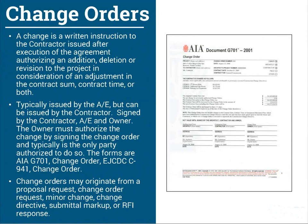The change order can become the center of contention on a project. It may also simply cover previous communications — a proposal request attached to it with a signature page summarizing the impact. It can be a cover for the change directive that formalizes what has been debated and agreed upon, or a cover for other items that have turned out to be a modification to the contract.